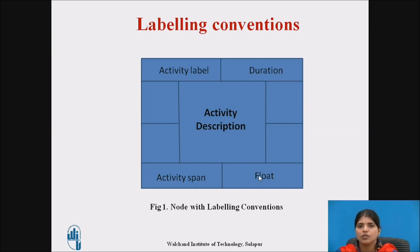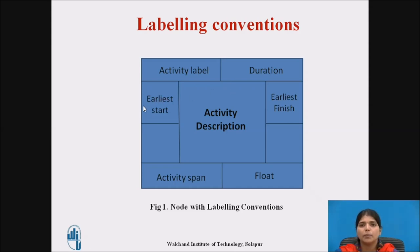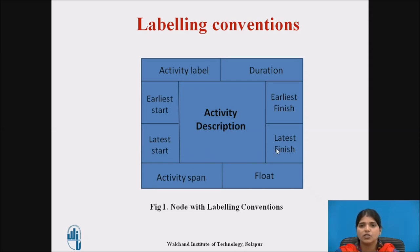These four components relate to the forward pass and the backward pass. With the help of the forward pass you calculate the earliest start and earliest finish date, and with the help of the backward pass you calculate the latest start and the latest finish date.